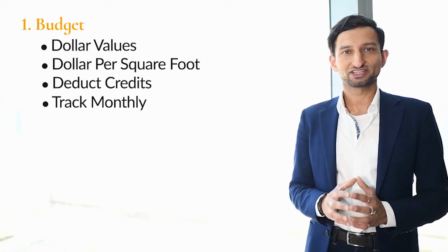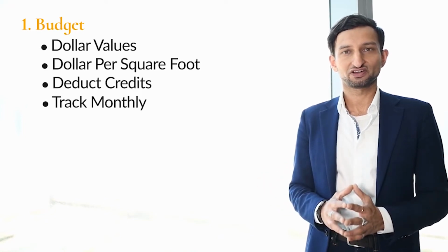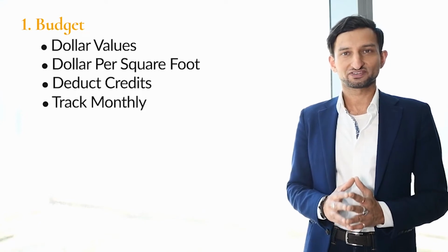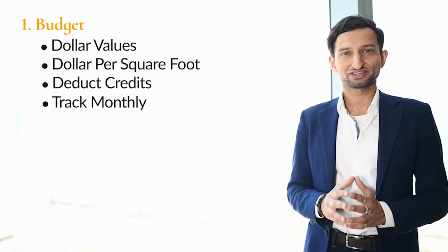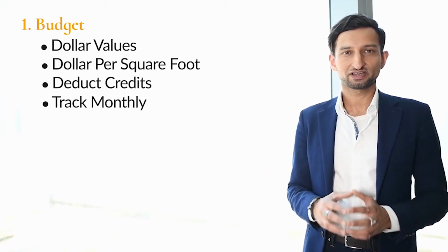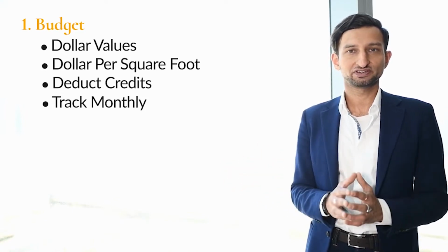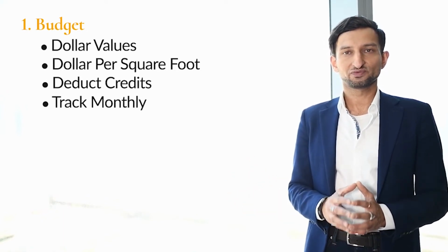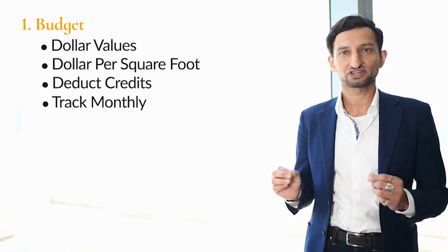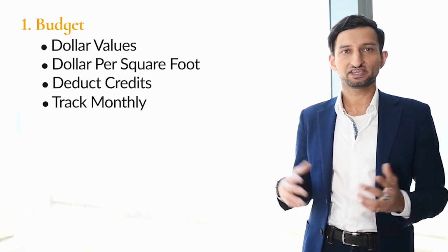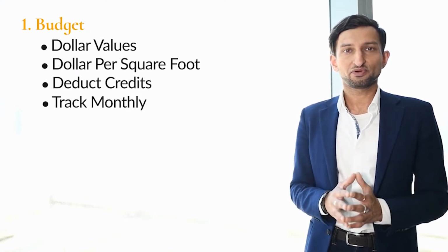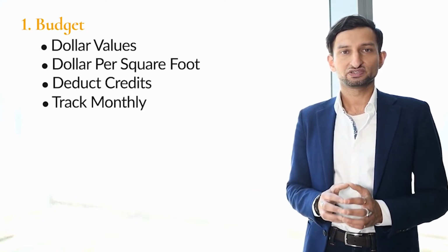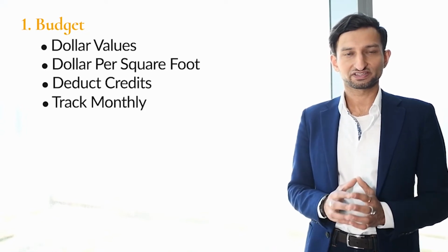At the beginning of your project, you should request an initial budget based on the early drawings, which might be schematic plans, renderings, and also submit these to your choice of contractors to achieve a very early stage budget. The same process can be coordinated with other professionals such as MEP engineers, AV and IT designers, or other architects, and other project consultants. Only once you have a full set of design, construction, furniture, and systems drawings, that means AV and IT, only at that point can you submit your project for a lump sum or other bid to your vendors and procurers to understand the real cost of your project.